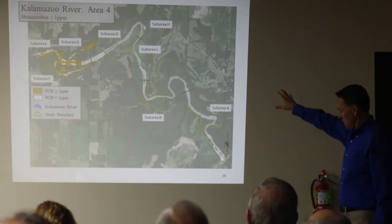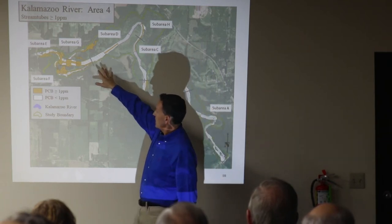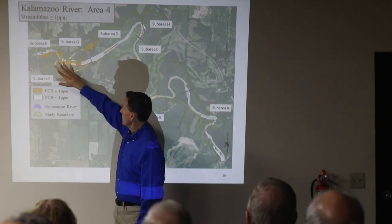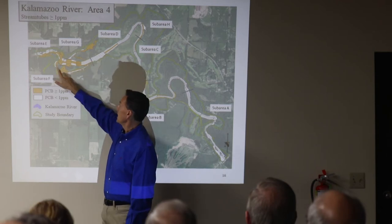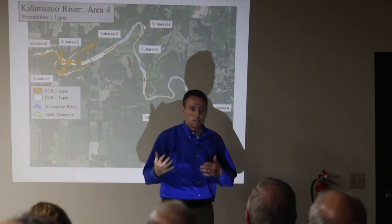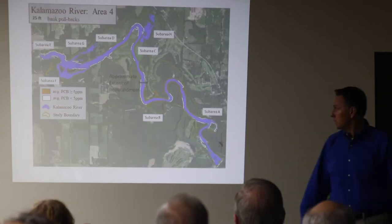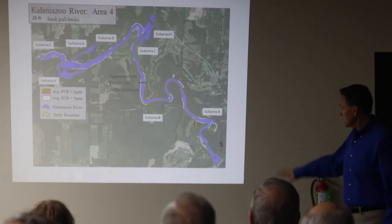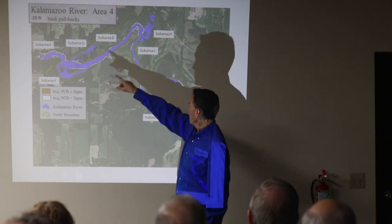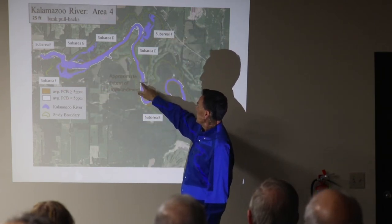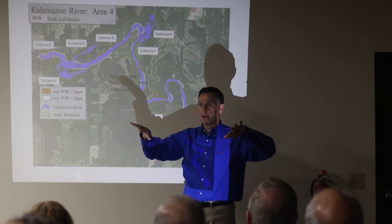This shows you, highlighted in orange, the areas that are greater than one part per million that probably have to be excavated — this is sub-area E, F, and G. You can visually see that from the map. The dam is there, and we're going to stabilize the banks from that point all the way downstream. All the banks need to be stabilized and addressed.